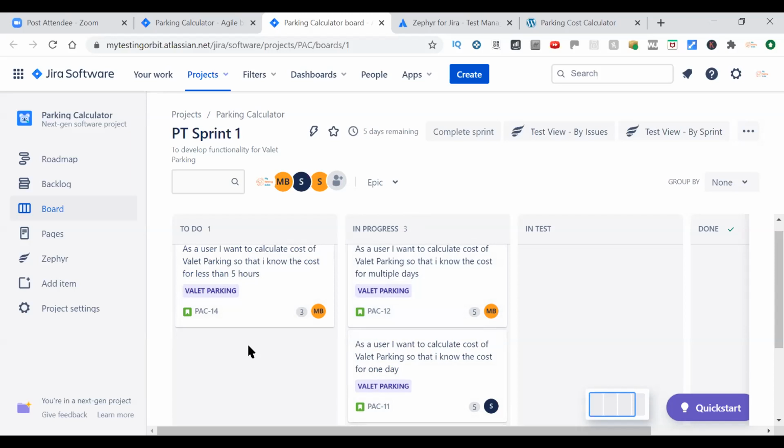And this is what is discussed every day in the daily Scrum. This board is always there because if there is any issue, we can identify it earlier. Maybe we are on day 6 or day 7 and still there are a lot of items in To Do and still a lot of items in progress, which means that with only 3 days left, maybe we'll not be able to finish and complete all of them. So that's the main objective of daily Scrum, that every day the team gathers for 10 to 15 minutes and reviews the health of their sprint, that is, whether we are on track to finish all the items by the end of the sprint or not.